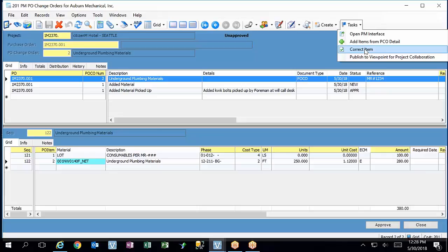I see. But what are you doing on subcontract change orders currently? So if you get a change order from the owner that increases your insulation value, do you put that money back in the insulator's task code, or do you put that money into a new change order task code of 900 somewhere? No, I would increase, so when I enter the change order in Maxwell, I would increase the contract value for insulation by whatever that change order amount was.